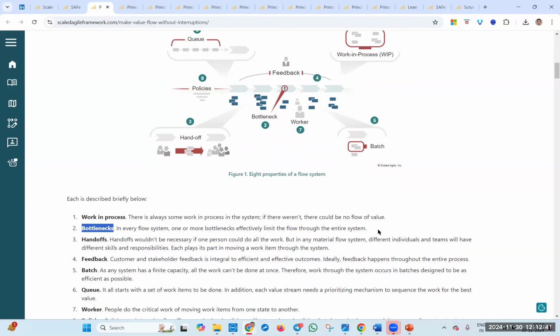In our case, by discussing and resolving the architect delays, we are able to improve the flow. In one of the previous engagements, the reviews used to take a lot of time. The coding and testing used to get done in 3-4 days. The reviews used to take another 3 days, which was impacting the cycle time, taking it to 7 days. Instead, we improved that review process and got it done within 1 or 2 days.